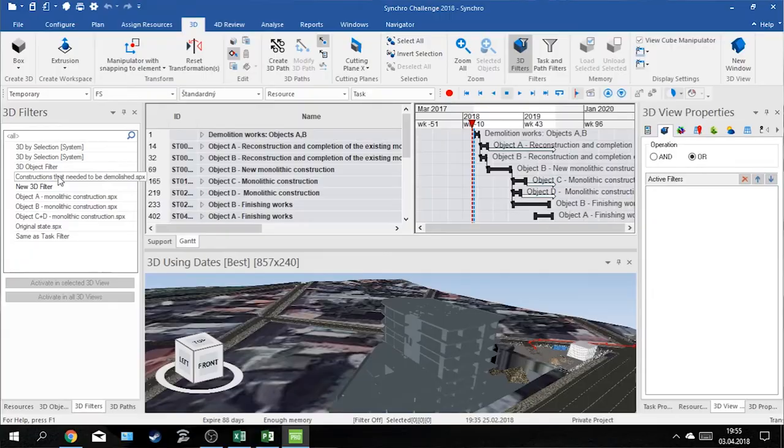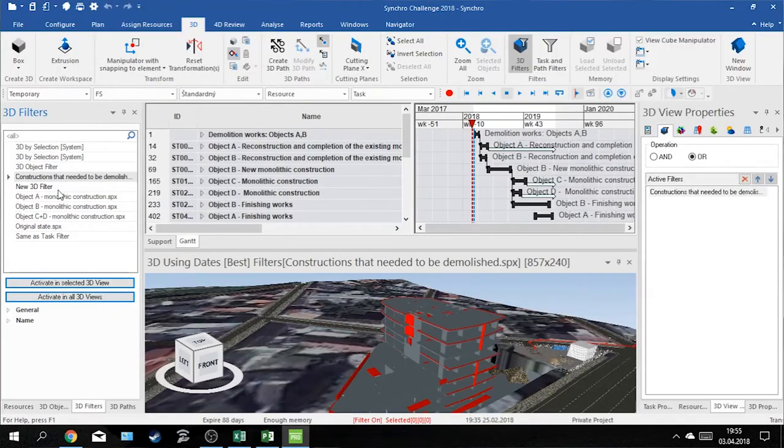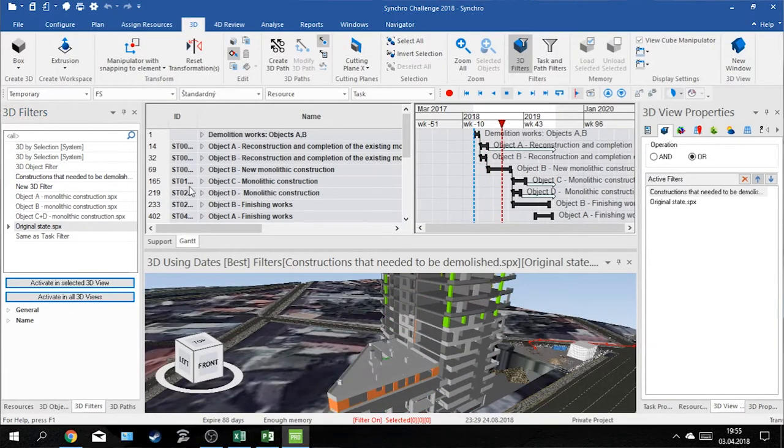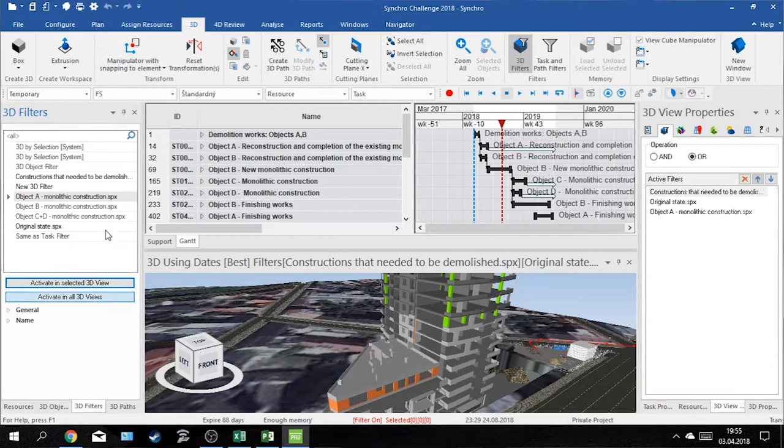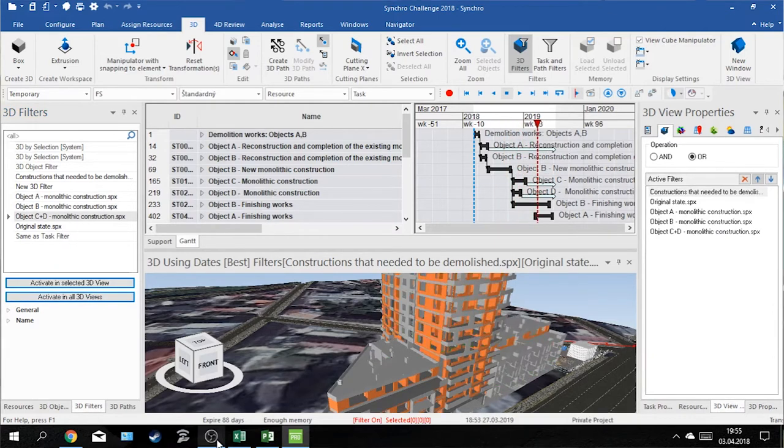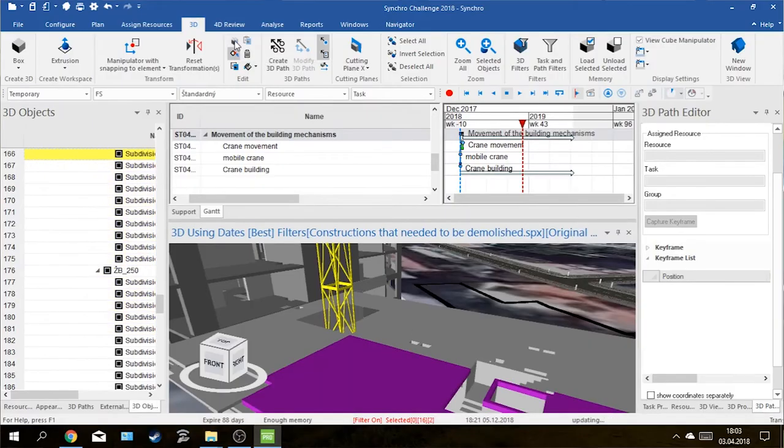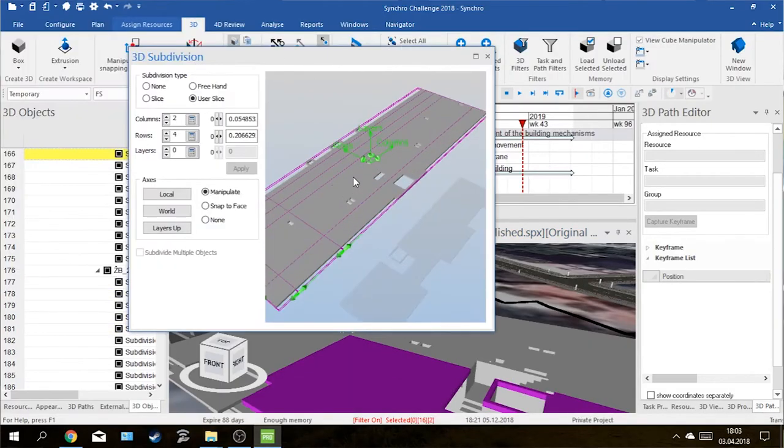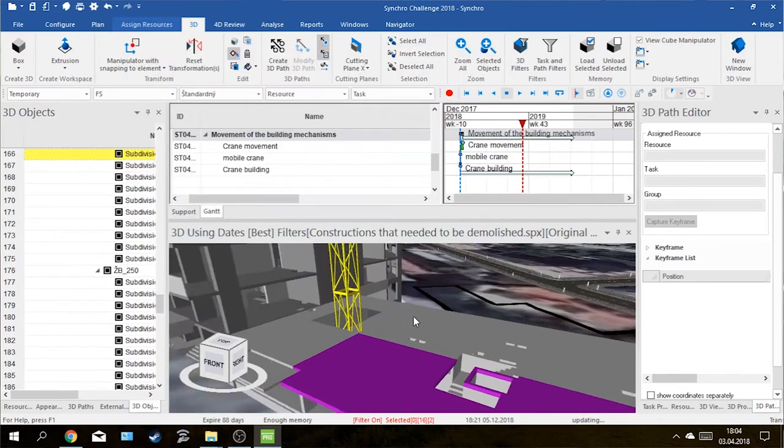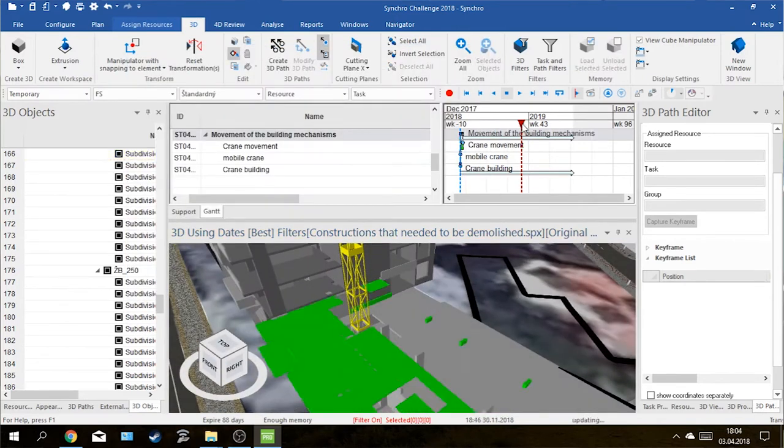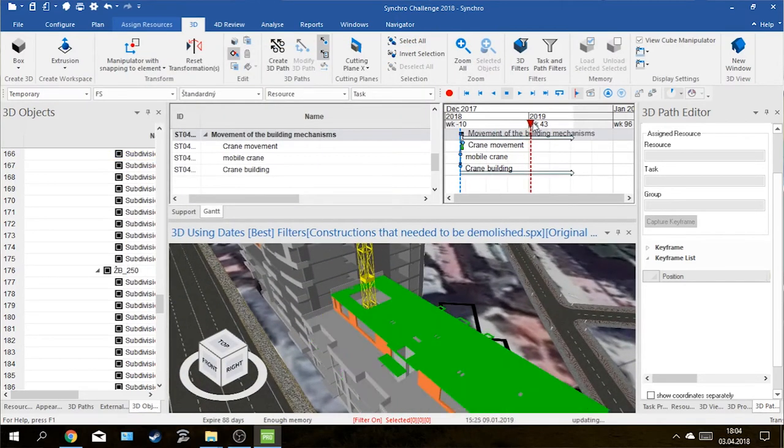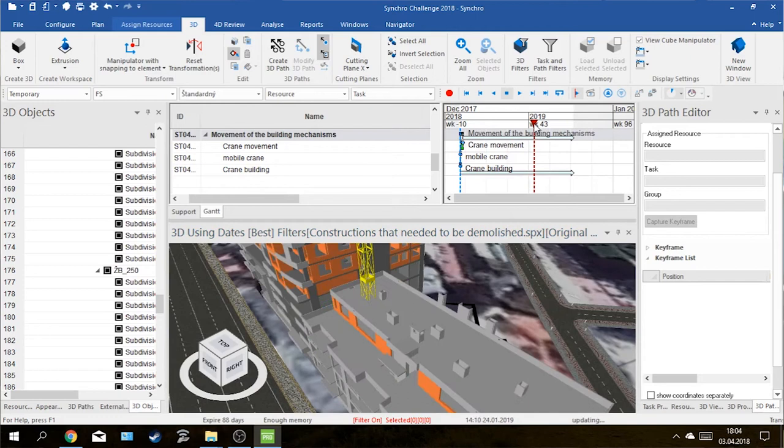When importing the Revit models, we found out that we imported these models with some color imperfections, which was not a problem because we could easily create 3D filters and change these colors as needed. During the assignment of 3D resources to individual tasks, we found out that our tower crane was modeled through all of the ceilings, so we decided to use the subdivision functions to divide these ceilings into the elements that we needed.